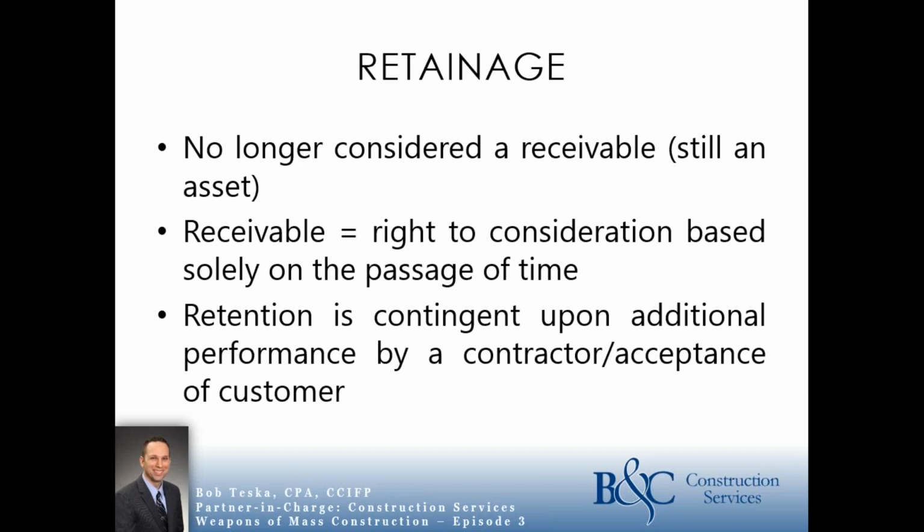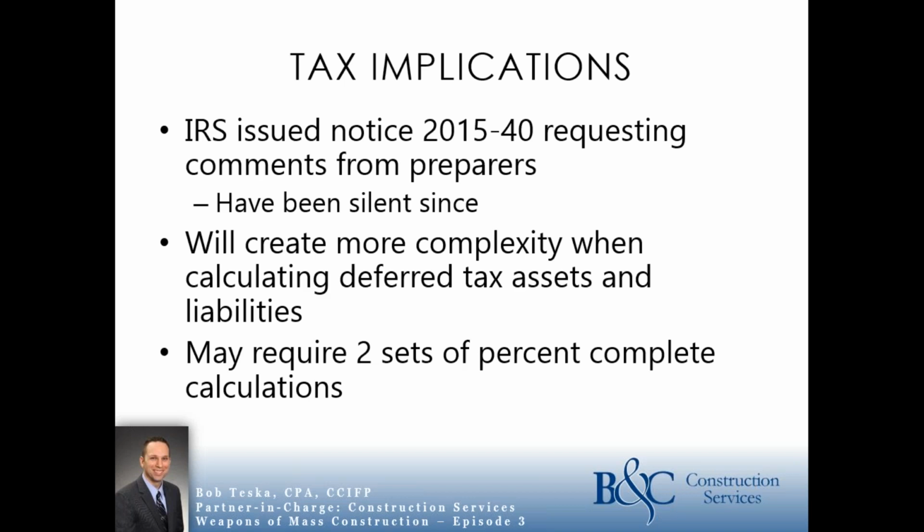When the job is complete, so you've got retainage on a completed contract, those retainages are due to you solely on the passage of time, so they'll be part of your receivable balance then. So you're probably going to see receivables broken out, or retainage broken out separately, retainage on completed and in-process jobs.